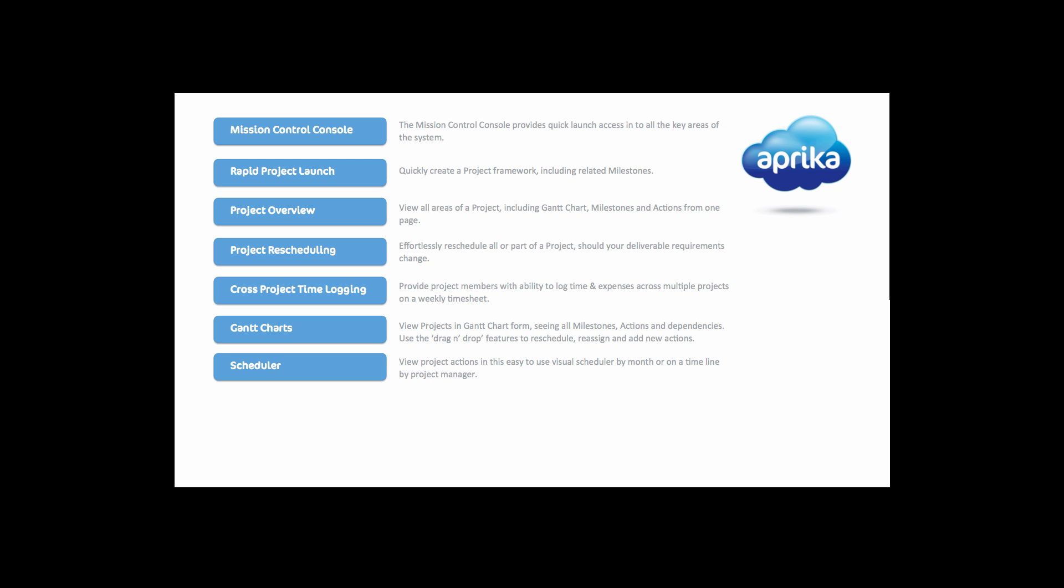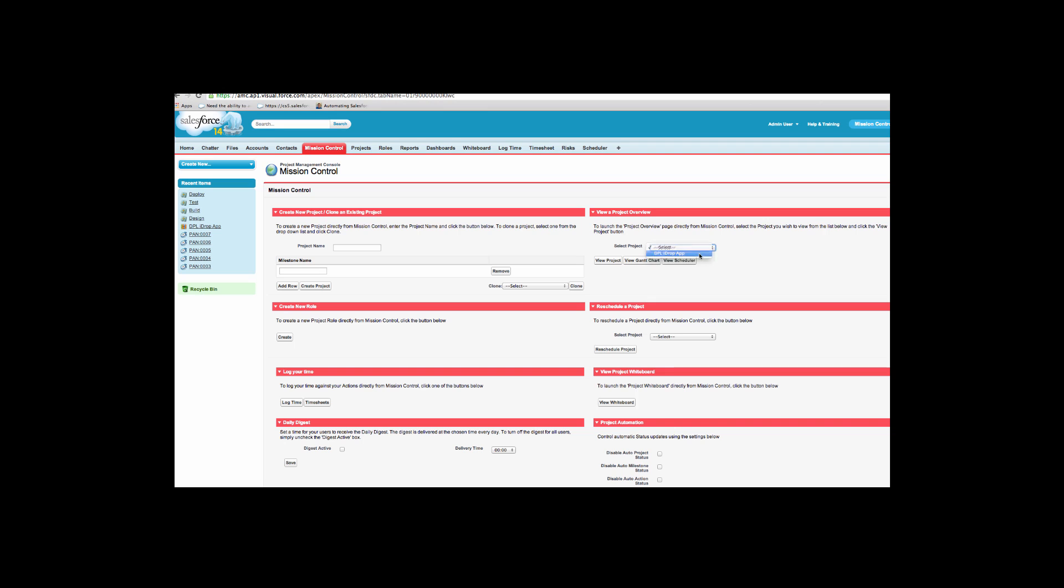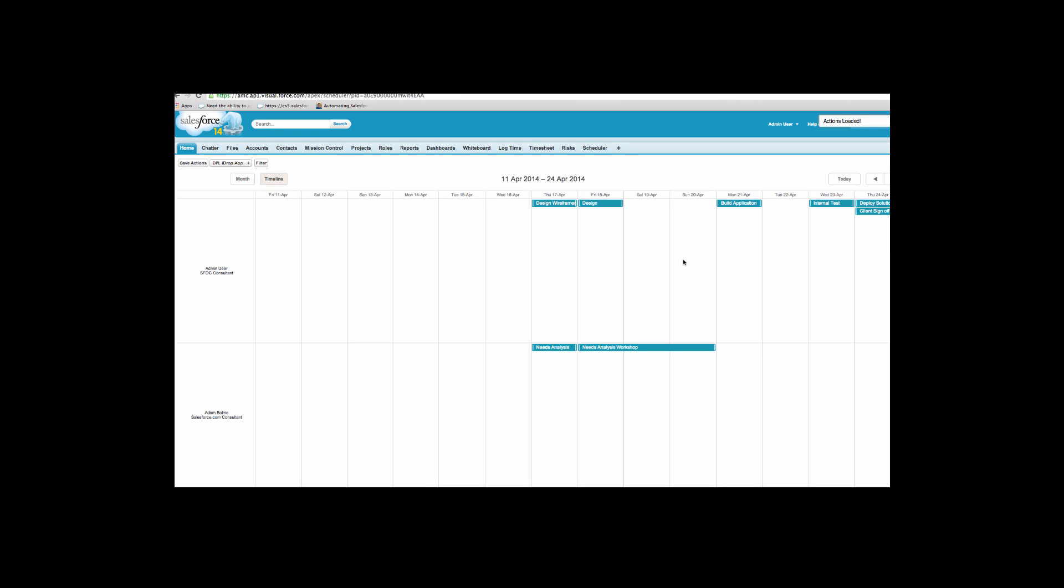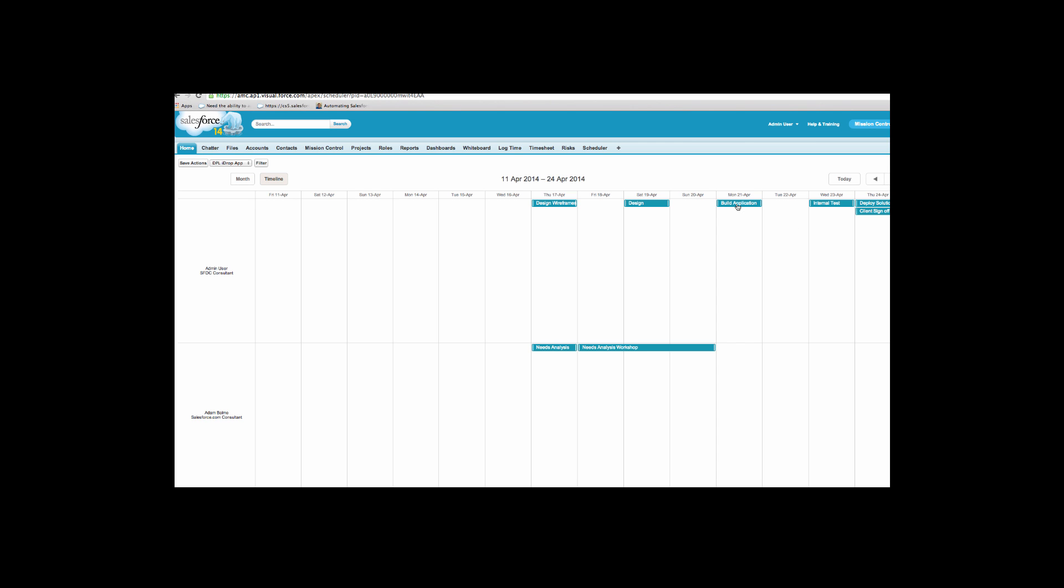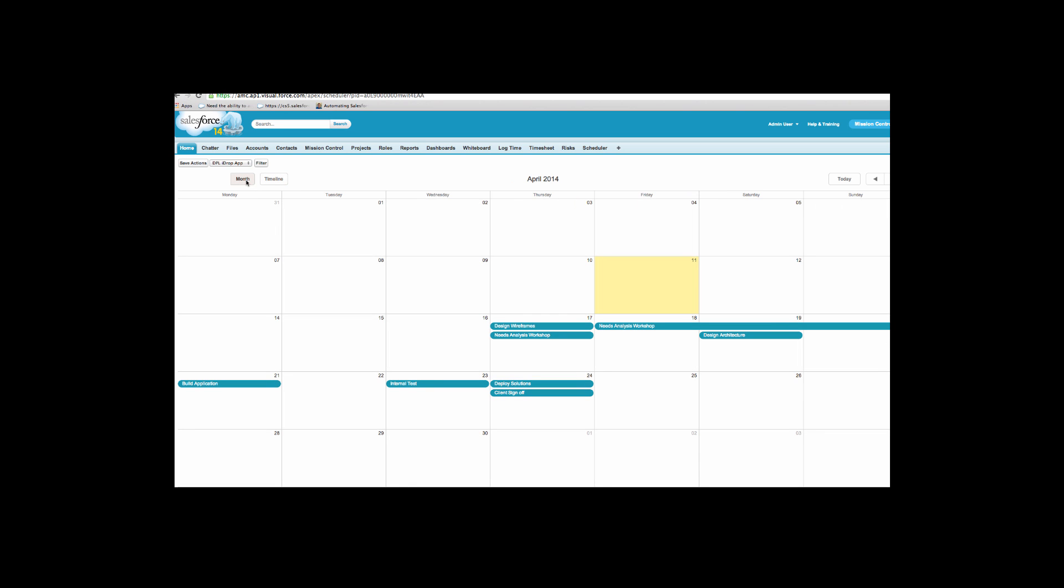The mission control scheduler provides a calendar style view of action records. Once again, this feature is very user friendly. You can view details for a specific action by hovering. You can also utilize the drag and drop functionality of the scheduler. The scheduler can display actions for all projects, or you can filter to a specific project and view by timeline or month. It enables you to reschedule and change ownership of any action, making it a very useful tool for capacity planning.